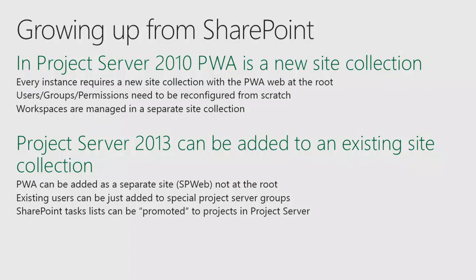Existing users that are in SharePoint, if they're added to special Project Server groups, are synced automatically in SharePoint permission mode. We also added a new feature to quickly create projects from SharePoint lists. Julie covered this in her session about how to get started and create projects quickly. Basically, if you have a SharePoint task list, you could create from a list item a project in Project Server, and then kick off a workflow and funnel it through all the approval process until it becomes a real project.